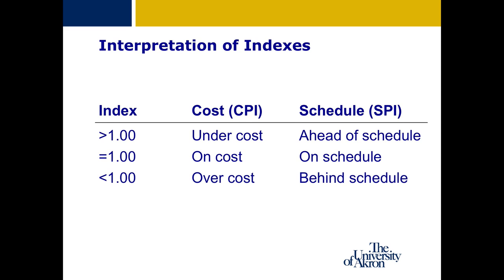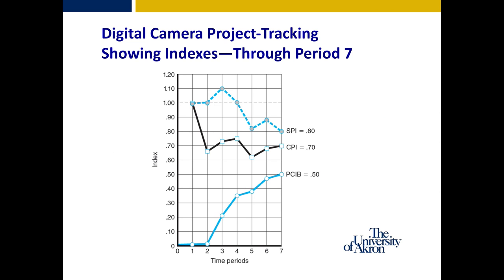For many index values, a value of 1 shows that a project is on track — whether by schedule or cost. A value under 1 shows the project is over budget or behind schedule, and a value over 1 shows costs are under budget or the project is ahead of schedule. A graph showing project progress through reporting period 7 indicates the project is behind schedule with an SPI of 0.8 and over budget with a CPI of 0.7. The PCIB shows the project is 50% through the planned budget (BAC), as the project was originally scheduled for 14 reporting periods.